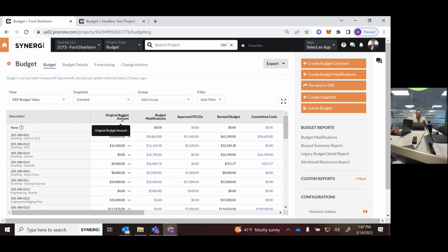Until this budget originally gets locked, you don't see any budget modifications, and you likely don't see too much else going on at that point in time. It's kind of our initial upload. That is being done by pre-construction, and when you guys are going through that handover process, where they're giving you guys the job, you have the opportunity to go in and meet on this stuff.